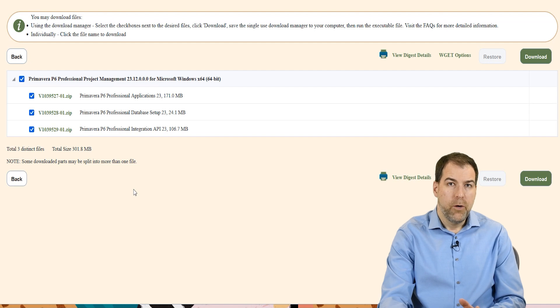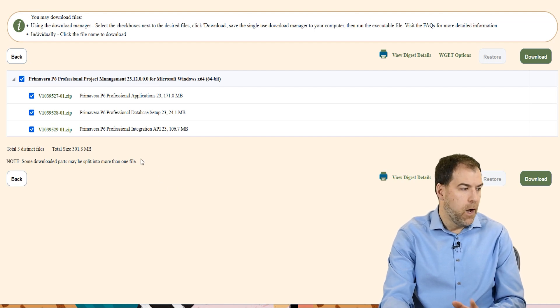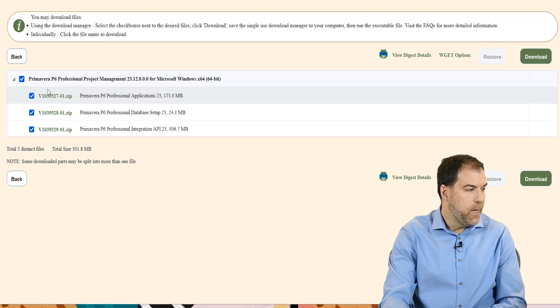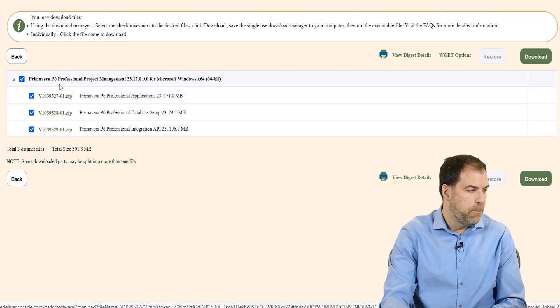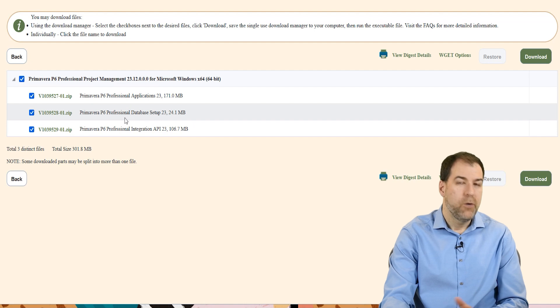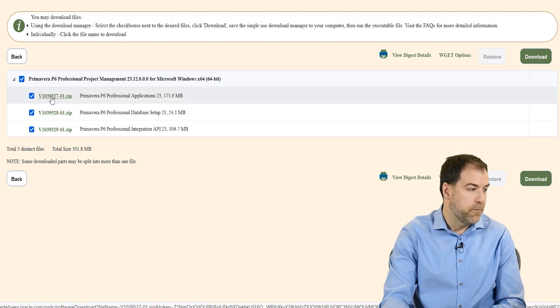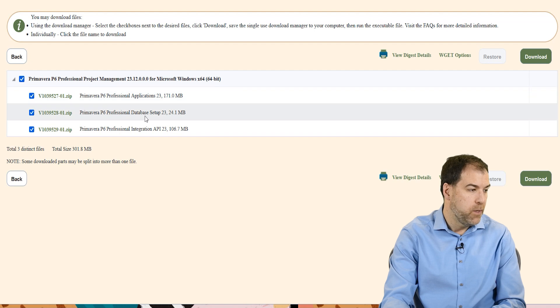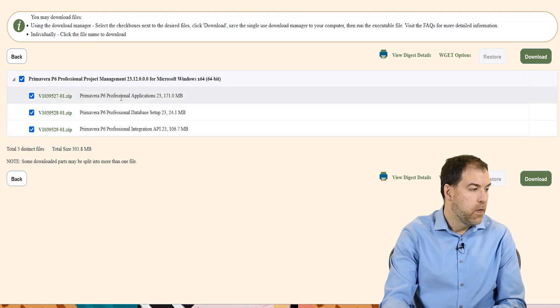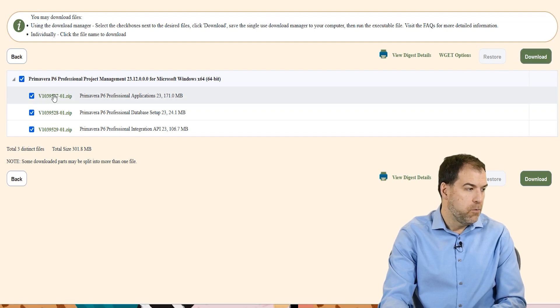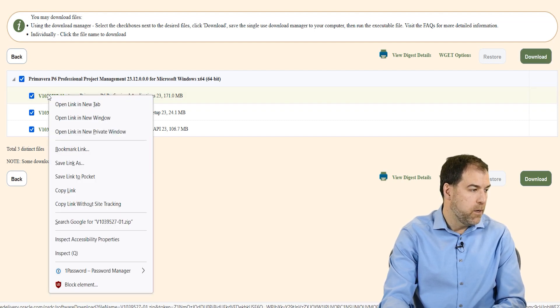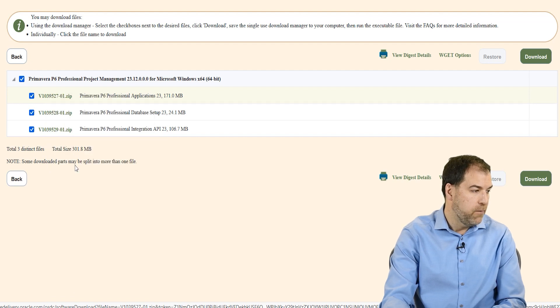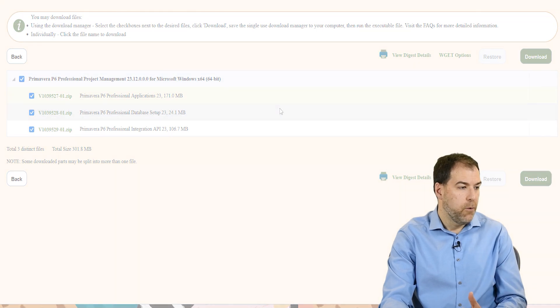Okay, we're about ready to download, but I'm going to simplify things for us a little bit here. We have these different packages, these different zip files that we can download, but we don't need all of them. In fact, the only one we need is the first one, the application. We don't need the database setup or the API. Just need the application. And instead of clicking this download button over there, I just like to right-click and do Save Link As or Save As depending on what browser you're on and download the software that way. There it is. I'm going to put it on my desktop and save it there.